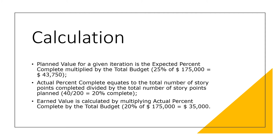It is important to note that in agile EVM, there is no credit for partial completion. Backlog items are either done or not done — that is, 0 or 100%. In keeping with agile terminology, a backlog item is only complete and story points awarded when the customer accepts the item as done.